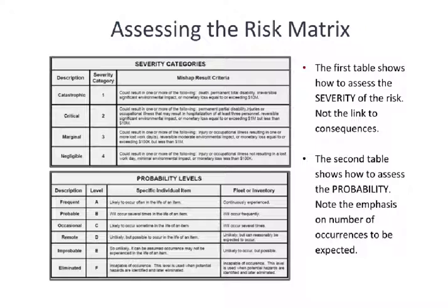If, however, you're managing a project that is planning a class reunion or planning a conference event or something like that, the entire budget of the project might be on the order of $50,000 to $100,000. Therefore, a monetary loss there of $100,000 would be significant.